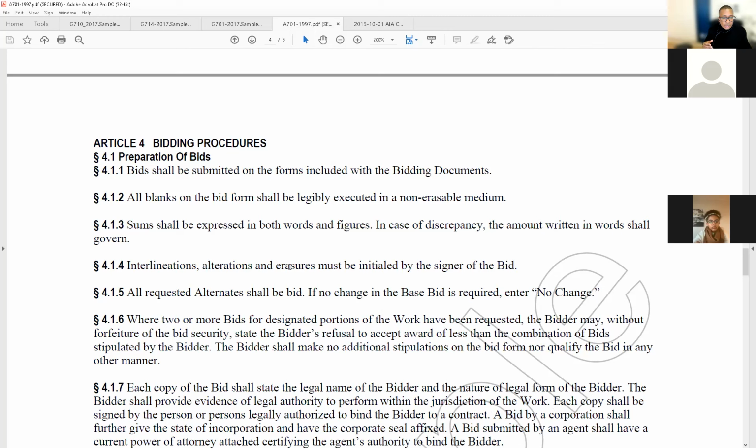For instance, in my case, and I'm using a similar thing, but it's not the same. When I'm applying for a request for proposals, sometimes they give me a form where I have to put the billing rates of everybody. Why am I going to use my own one? They're giving me one. Just fill it out. Don't do your own one. Because why? Well, you probably get disqualified, period. If they see something that doesn't look like what they told you it should look like, you're out. There's no tolerance for mistakes on this stuff.